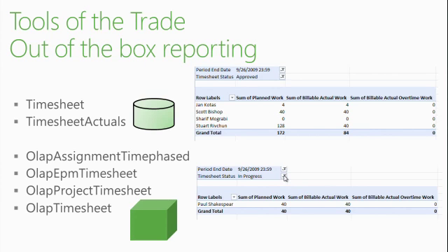On another query, just by changing the value of the filter, I wanted to show what's in progress. In progress means it was submitted by the user, but it has not been processed or approved or rejected by the approver. So in this case, I will see this user. Here I have just a username, but from the query you can grab the project name, the task name, and everything, and that will give you all the information for the date. All right? So these are available, they are documented, they are part of the product, and you can use that, but you have to build your own; you have to drag the right fields to be able to show this type of thing.